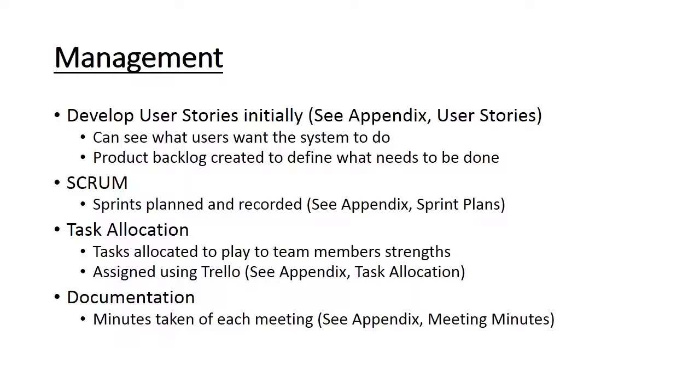These would be used to identify what the users want to achieve from using the system, allowing further documents and prototypes to be created from this analysis. Scrum methodology was used to keep the project agile. The sprints were 2 weeks in length in order to line up with our assigned lessons, and also allowed for a weekly meetup in between for further discussion.